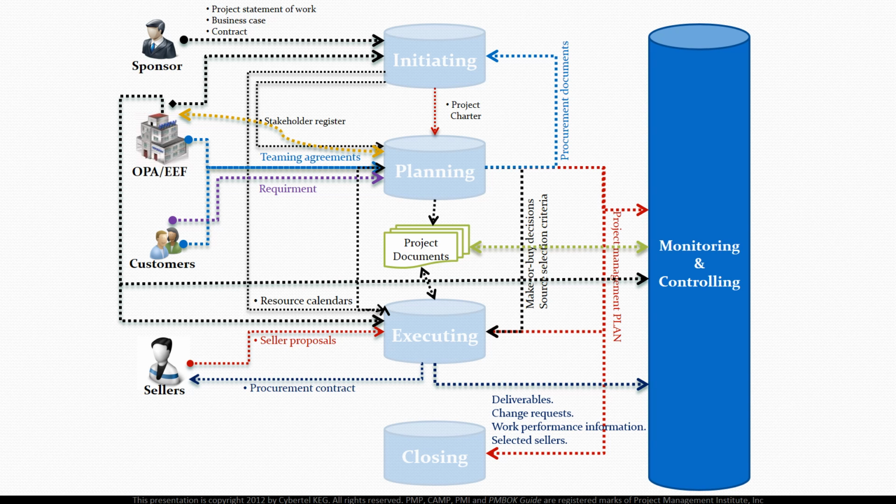What exactly is the project team monitoring? They are monitoring and controlling the work being done within a process group, and also monitoring and controlling the entire project effort. The outputs of this process group are the approved change requests, control measurements, and performance report. In case of multi-phase projects, this process group coordinates the project phases in order to implement actions against issues to align the project with the project management plan.